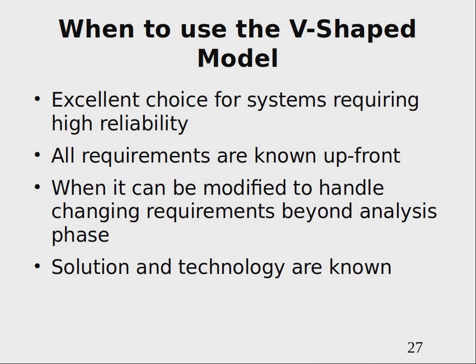Because if you need high reliability of systems, very good traceability and very well tested, very critical systems, then the V model is still considered one of the best approaches to be sure that the system is very well designed and very well tested for critical applications.